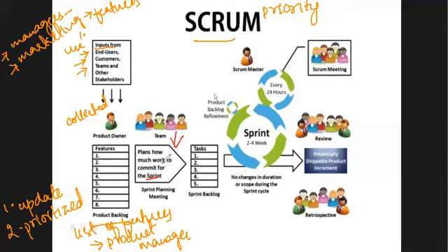These people are going to identify what work each team needs to do. That is a small working team. Now in here, you make a sprint planning meeting. Then within the sprint backlog, you're going to take one specific requirement, and based on that specific requirement, you are going to deliver that specific feature in a time box. That is, within that specific time frame, you're going to design that particular feature.